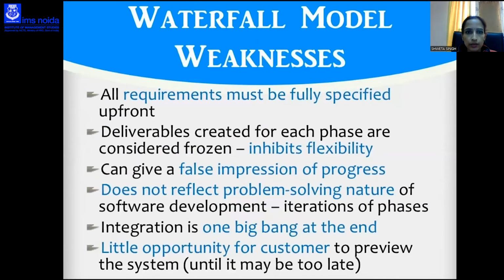There are some weaknesses. All requirements must be fully specified upfront. Deliverables created for each phase are considered frozen. It can give a false impression of progress and does not reflect the problem-solving nature. Integration is one big bang at the end, with little opportunity for the customer to preview the system.